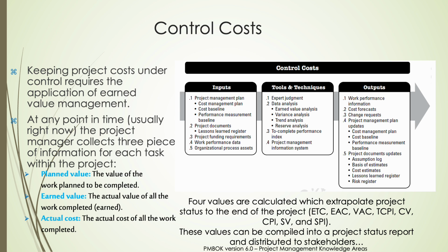and documents. Key concepts we track include planned value, how much work we should have completed; earned value, how much work we've actually completed; actual cost, how much we've spent so far. By comparing these, we can spot any cost overruns early and take action before small problems become big ones.